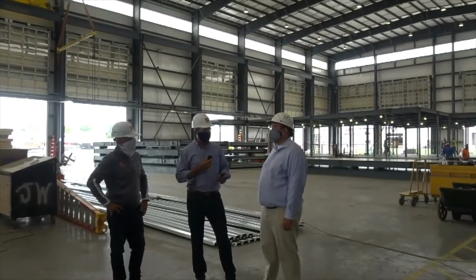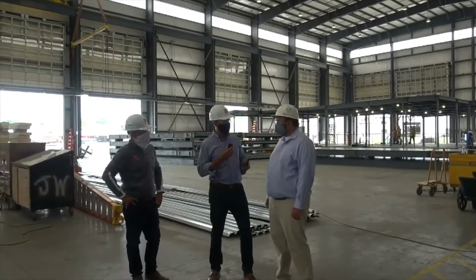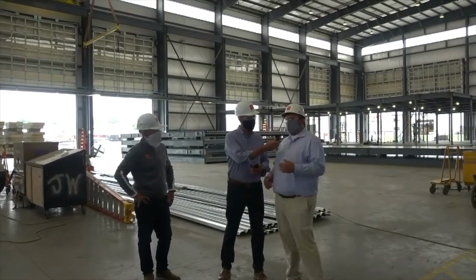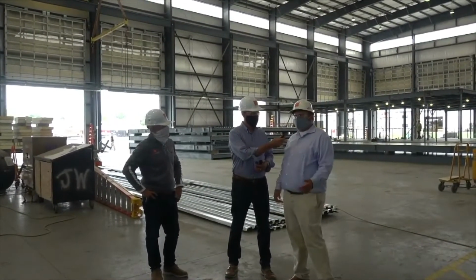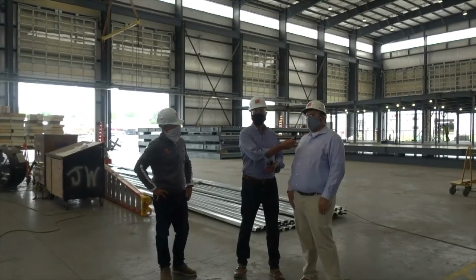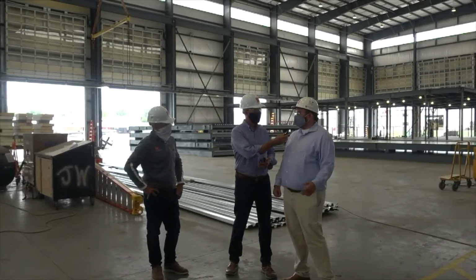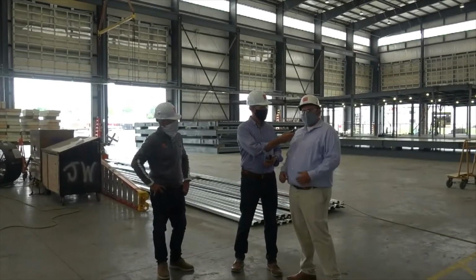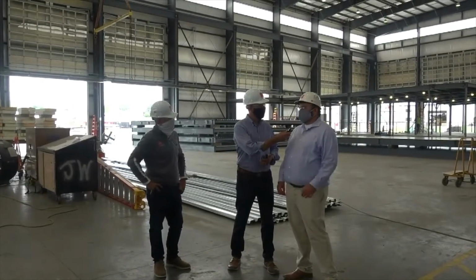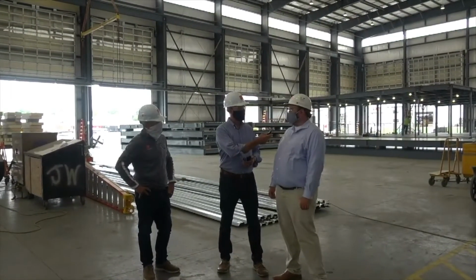Walking around, and I think it's really important if you elaborate one more time so everybody understands your role and what you're doing and how important it is, because I think we didn't touch enough on it in the beginning. Yeah, so I'm the pre-construction manager here at MODLOGIQ. I work front end with the GCs, customers, and the design teams to help the designers follow through to make a modular friendly building with Bill and our design team, as well as working out the scopes of work and the estimating side of the project to bring it in at budget for the client. So scope of work is huge, as I discussed before. You don't want scope gaps or overlaps. So it's really important to have detailed scopes of work on a modular project due to the two site projects.